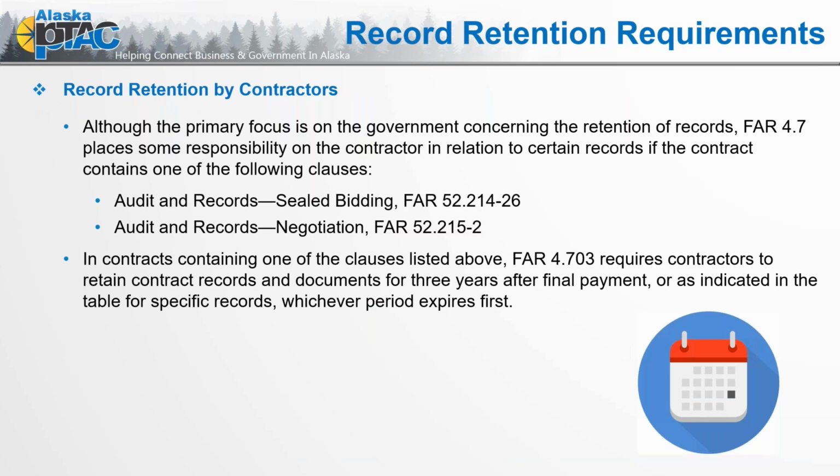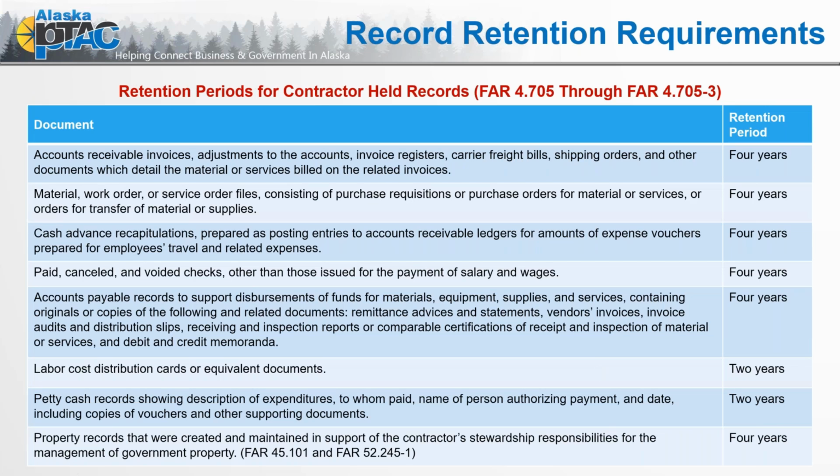And what I've done, so this is record retention by contractor, here is the information, depending on whether it was sealed bidding or a negotiated contract. Here's the FAR language that defines how long you should keep those records. And in fact, I have a table here, built over 2 slides, that says, here's the document, here is how long you should maintain those documents as required by the FAR as part of your contract compliance.